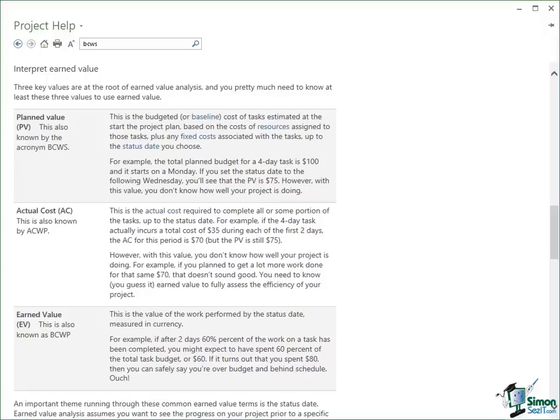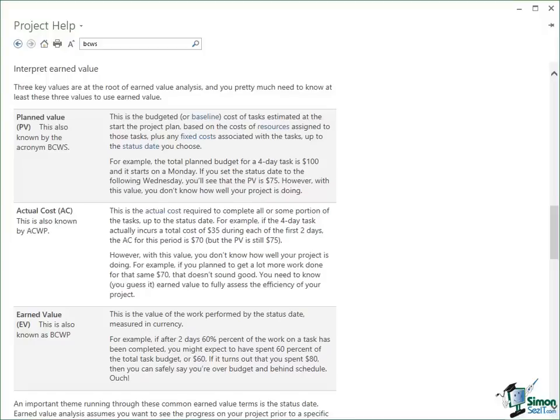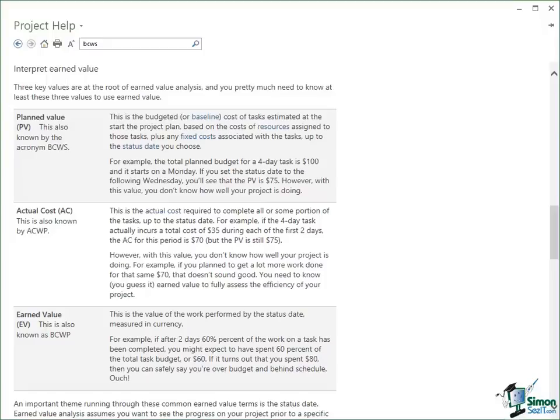That may be completely different from the cost of doing that work. I may well not have spent $60 doing it but the value of what I've done is $60. If in fact, as the example on the help there says, you've spent $80 getting there then you're really not doing very well whereas if you've only spent $40 or $50 getting there you're actually doing pretty well. So the earned value says let me look at the work I've done. What is the value of that? What was my budgeted cost? How much did I think getting that amount of work done would cost? 60% of a $100 task gives it an earned value of $60.